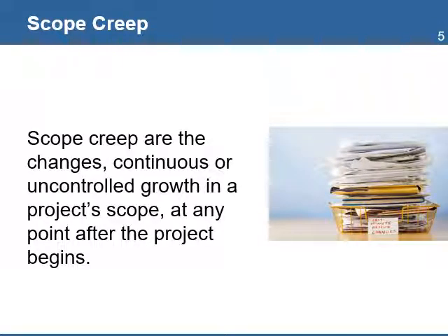Scope creep in project management refers to changes, continuous or uncontrolled growth in a project's scope at any point after the project begins. It is a tendency to include more tasks than originally specified, which often leads to higher than planned project costs and an extension of the initial completion date. One of the goals of scope management is to control scope creep.